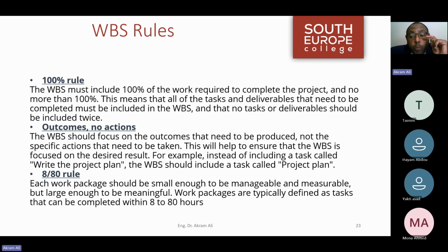So I have to decompose my project into product breakdown structure before I proceed into performing work breakdown structure. So when I say product breakdown structure, I am breaking down a product. And when I say work breakdown structure, I am taking the smallest piece of this product, and I am defining what kind of work and activities I need to do in order to realize it and have it in actualization.